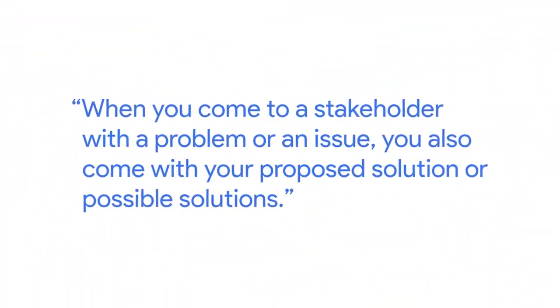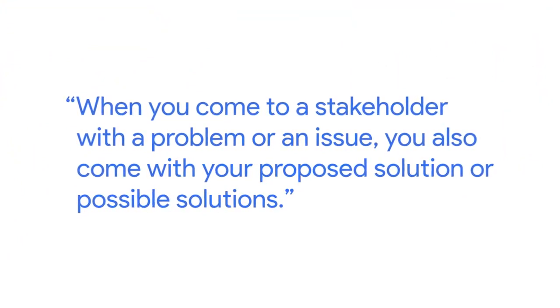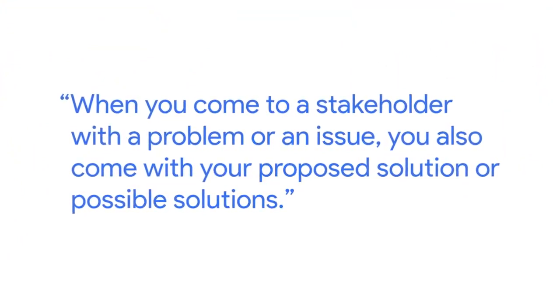Another good tip is when you come to a stakeholder with a problem or an issue, you also come with your proposed solution or possible solutions. Thinking about not just asking, what do I do? But saying, I think maybe we should do A, but we could also do B and C. What do you think? That gives them a starting point and they feel like you've done the background work and you know the problem really well.